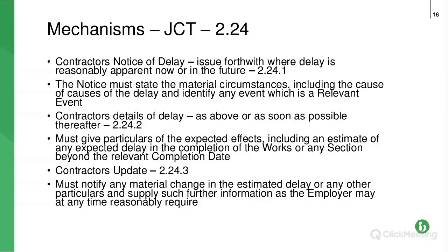This slide, again, I want to skip through it, but again, I've put it in for completeness. It effectively goes through, you can see there are 6 bullet points. So the first one typically, so all the odd number bullet points relate to a clause, and the next bullet point explains what that clause says. Now this is important to you contractors and subcontractors, because this is what your notices need to say when you're claiming for delay. So it's both the time limit, you've got to give the notice within X days. You'll see for the first one it's forthwith, so immediately the delay becomes apparent.